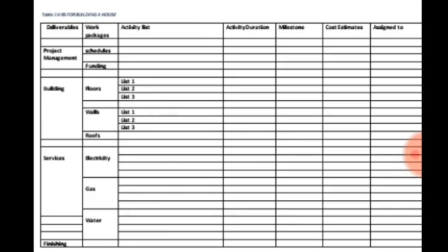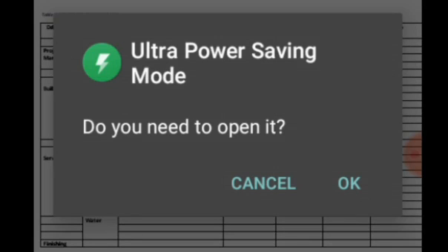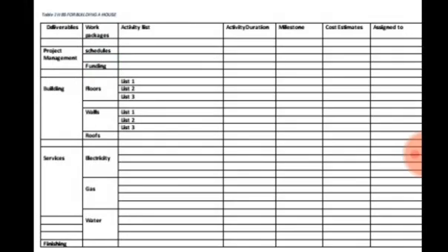You understand? Now, once you've been able to deliver on these 3 activities, you've dug the foundation, you lay in the blocks, then you floor the house. You understand? You've been able to deliver on that floor of the house, that work package, which is the floor of the house. Now, the next work package is what? The walls of the house. What are the various activities for you to deliver on the wall of that house? You understand? Because you can say, all right, maybe the first thing is for you to do the pillars of the house. You build the pillars of the house.